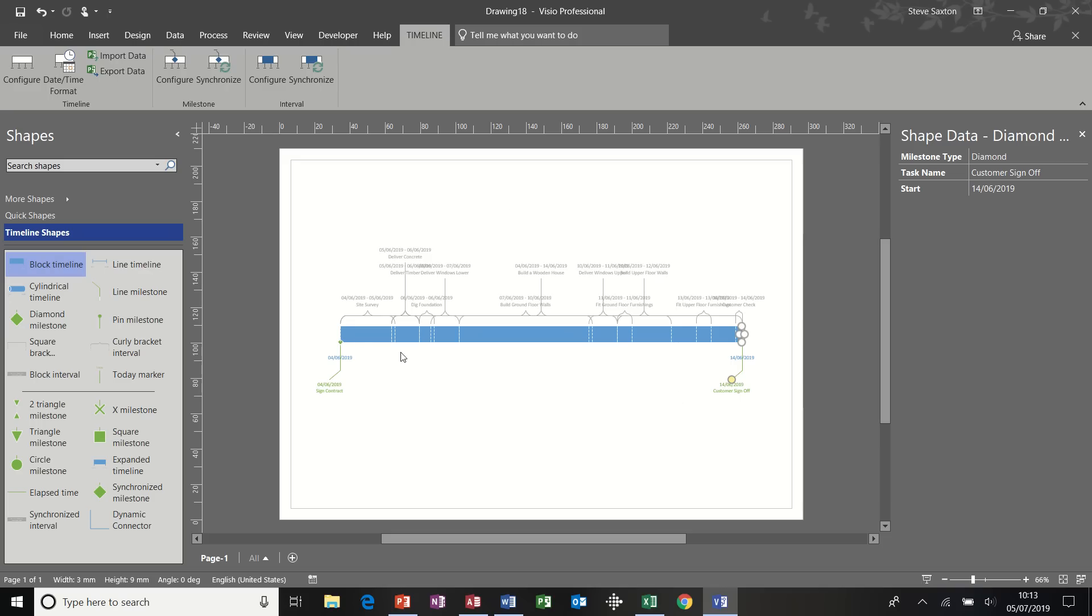Now, you can see this is slightly cluttered. So you will have to edit this slightly, moving things around, moving the labels. But this is the information that is in the Microsoft project file. Now, this information is not linked. So if the project file changes, this does not change. You will have to change it manually or rerun the wizard.